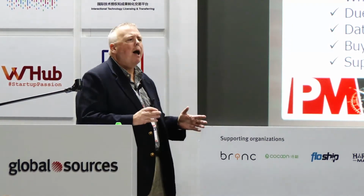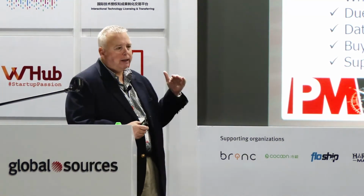So you have to be very proactive on your own. And you can do that very easily. Just, you can have a system. You can just use an Excel sheet, but be very diligent about it. Set up a time every week where you're going to call Mr. Wong and say, hey, Mr. Wong, at 10:30 on every Wednesday, we're going to have a meeting. We're going to go through all the tasks that are related to the current production, and we're going to go over each one until they're closed out.